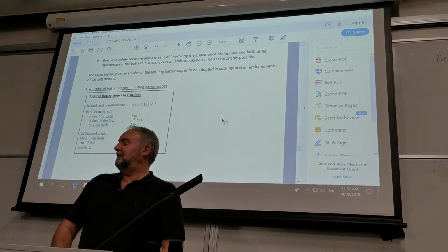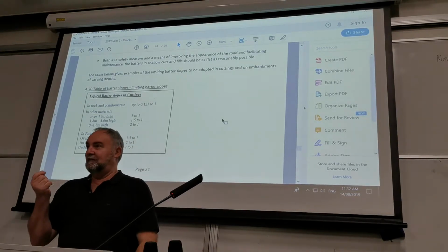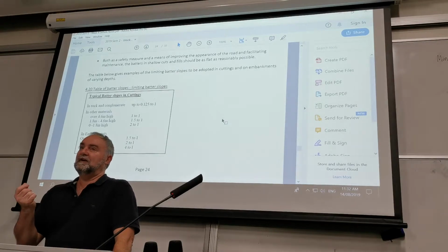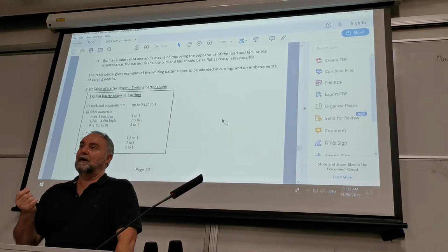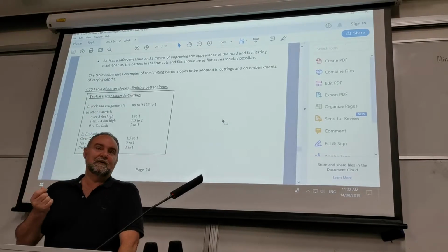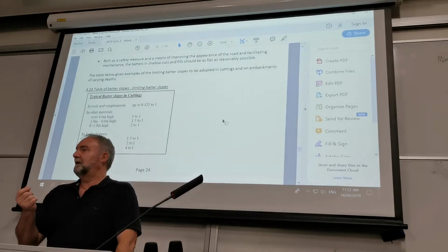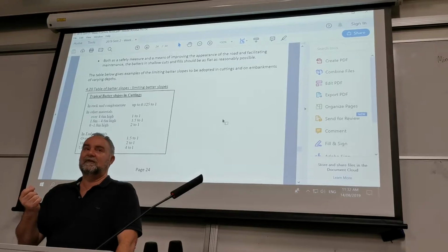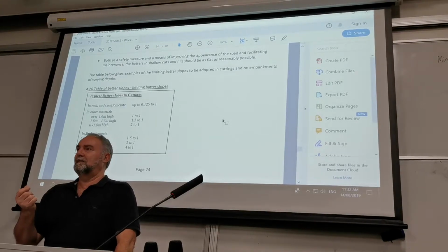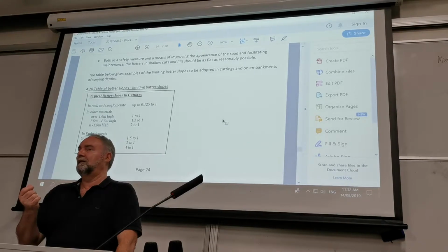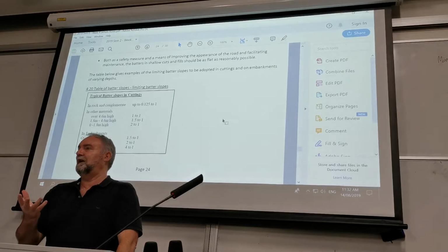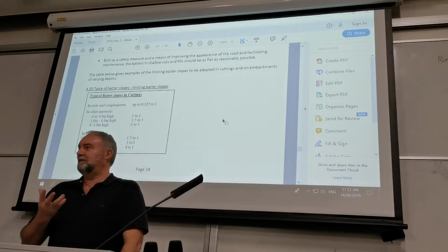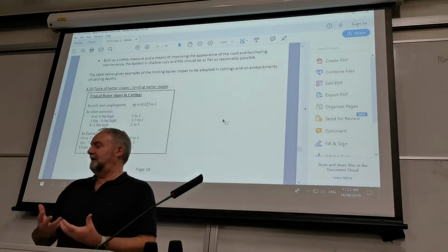So that means cost. And once you're getting proper fill like that that's clean, you're going to quarries, and they're quite a long way away. And as we all know, driving around Auckland isn't fun. Once you get past about 7 o'clock in the morning and all the way through to about 7 at night before you can start moving again. So that costs money. Trucking companies, haulage, they have to take that into account. So it costs more and more to deliver.